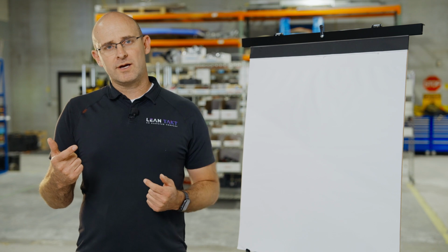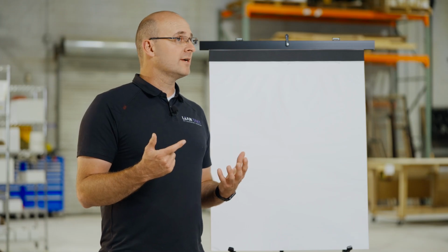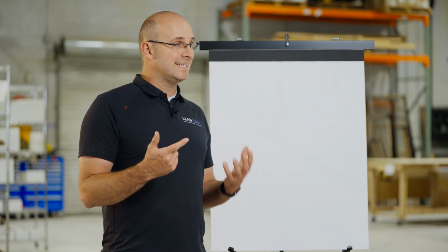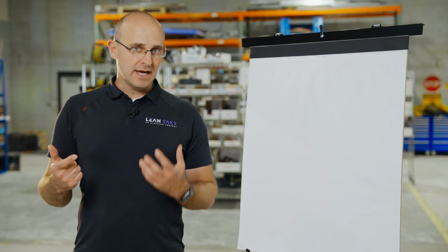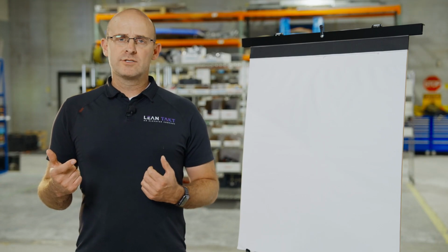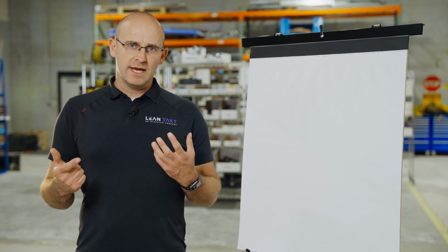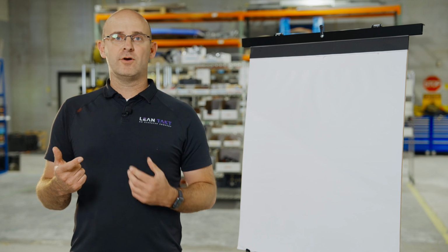We also talked about that if you are actually implementing that flow in the field, we're also preparing the areas with the right key needed resources. And if you don't have the resources, that's a roadblock that should be reported in the afternoon foreman huddle. So this is all what a crew leader would do to find and create flow in the field.